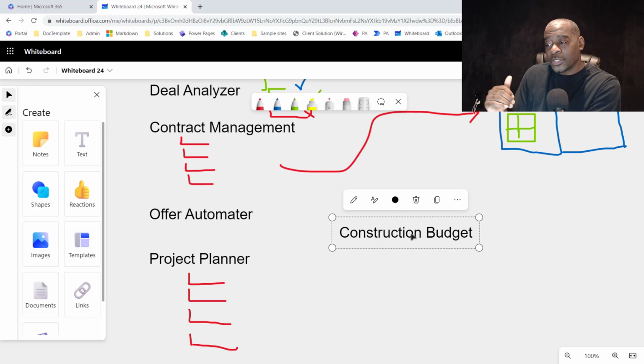A lot of this may be hard to calculate, but they already have a system in place where you can itemize and calculate these numbers, and exactly what you should be spending. The goal is to stay under the budget number for that particular line item. If you go over, that's usually a yellow flag unless you can make it up in other items in the budget. So really this is creating that construction budget.